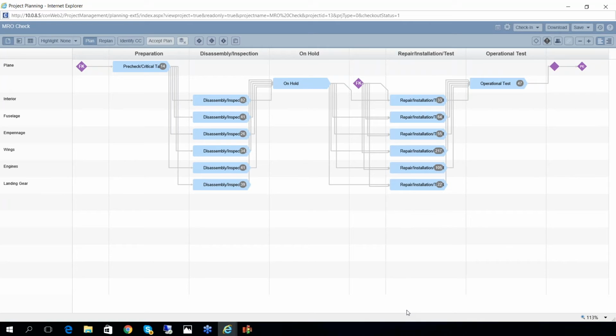And in maintenance, repair, and overhaul, for every repair that they do or every piece of work they perform, they have something called a work card. So there are 700 work cards inside this project plan, representing about 200 days of duration and, give or take, about 70 to 100 people working on the project through its life.